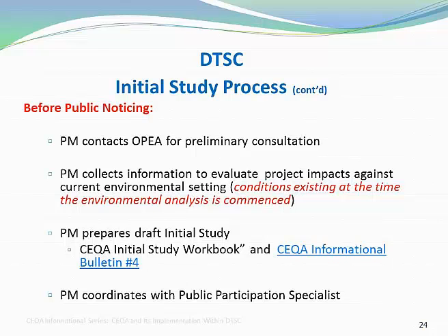and activities that may affect the interests of any responsible or trustee agencies. For example, if the project involves excavation, the local air district, Native American Heritage Commission, Regional Department of Fish and Wildlife, state and federal if necessary, local planning agency, and so forth may need to be contacted.